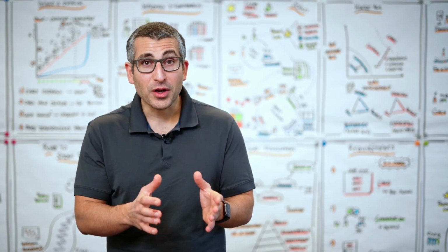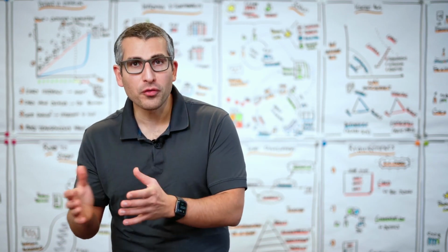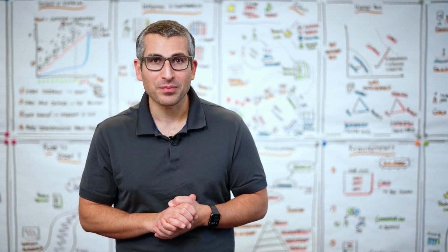And last but not least, step number 5 is closing the retrospective. This is a great opportunity for a Scrum Master to A, summarize what we discussed, B, highlight what we are going to change in our next sprint, and C, collect feedback on how they conducted the retrospective. After the retrospective, we would ideally move into our next sprint planning.